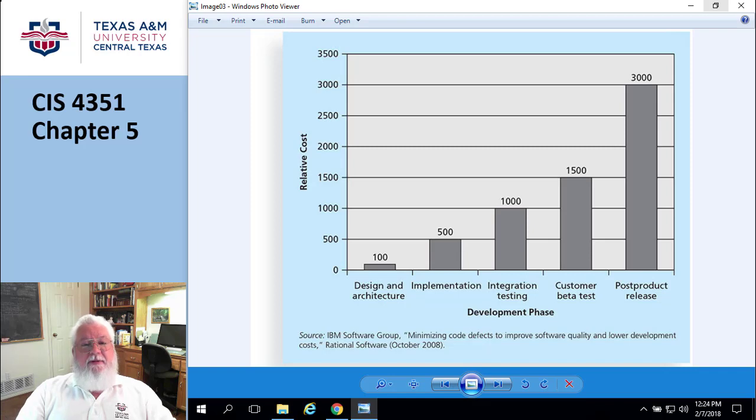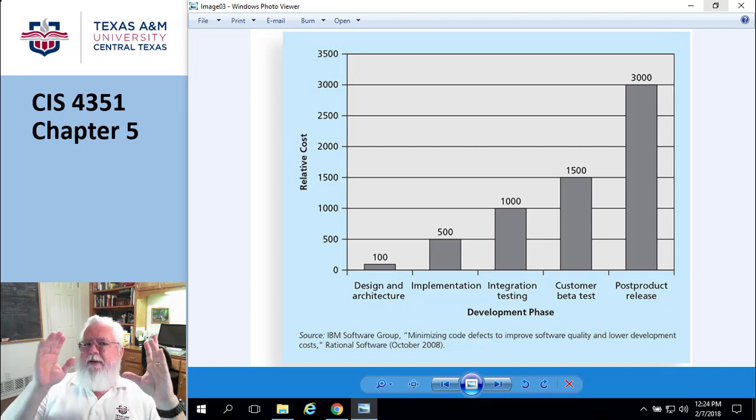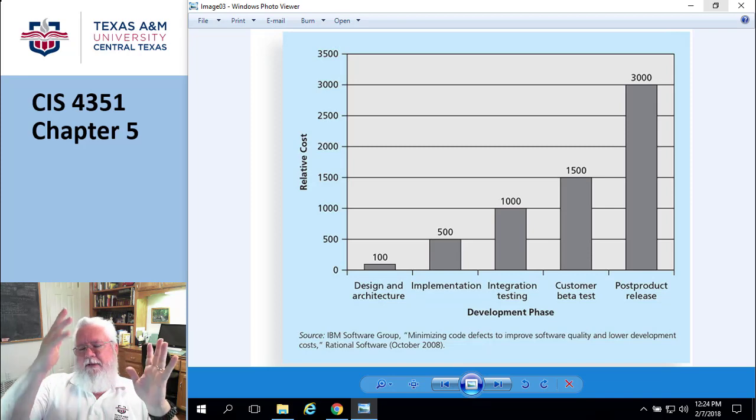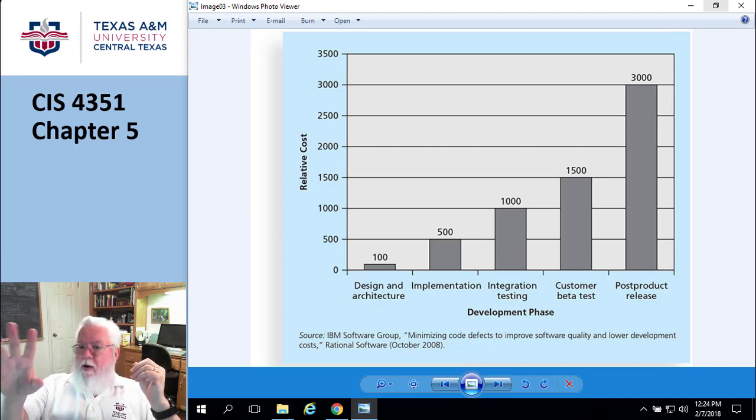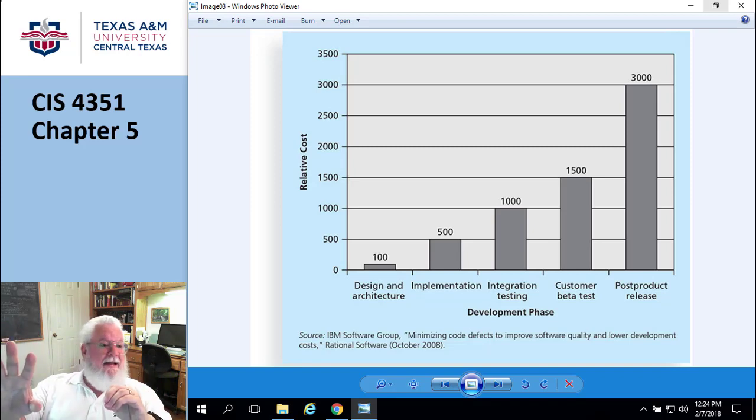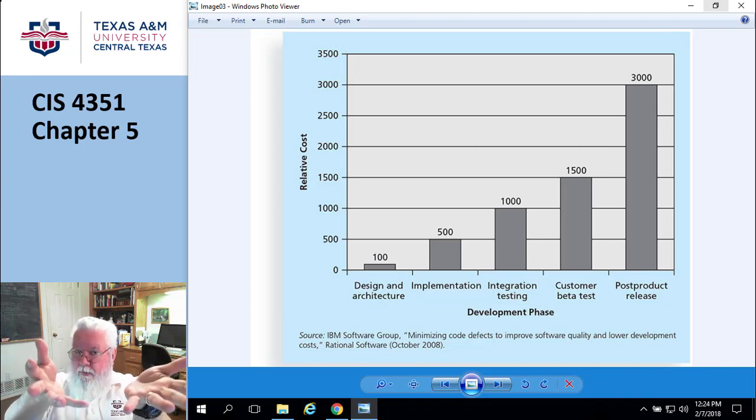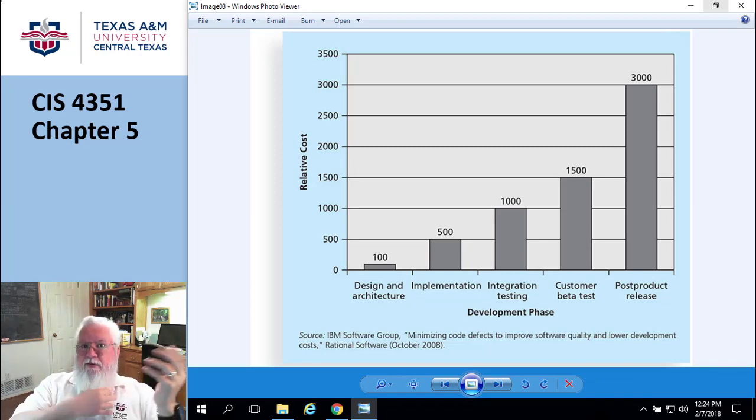Product analysis. Particularly if you've got an old product that you're replacing, then you just analyze the product and you know a lot. Alternative analysis is pretty cool. For example, let's say that I'm building a toaster. What I do is I go to Amazon and look at all the toasters that are available and go, wow, almost all of them have this feature. And you go, dang, we don't have that. Let's add that feature. Requirements based not necessarily on your needs, but on looking at alternatives.